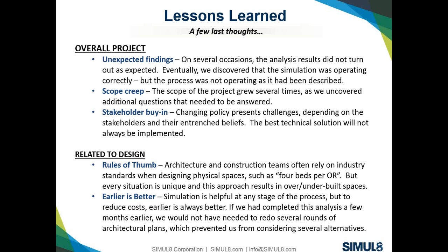The second piece that I wanted to talk about is the scope creep. Clearly, we started off with one question and we ended with a different one, which is not necessarily a lesson learned in a, gee, we shouldn't do that again sense, but an important thing to think about when we talk about planning and resources, and expecting that sometimes there will be scope creep. We should probably plan that into our timeline because we know that we're going to find things that weren't expected. And then finally, the stakeholder buy-in. Clearly that is a key piece to the successful implementation of any project.